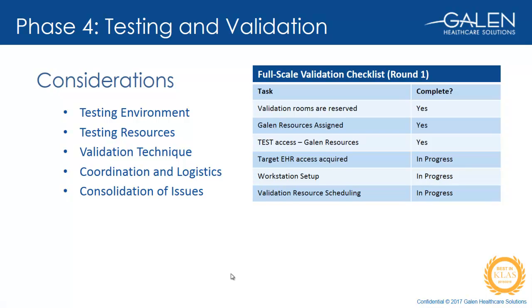So therefore, we usually recommend that the testing environment be refreshed very close to when the project team will begin work. And other things, for example, the environments would need to be in sync in terms of the software version and the like. So another item to discuss with the client is the plan for converting patients into the environment being used for testing. Sometimes an ADT interface may be set up. We often recommend pointing it at the testing environment to convert the patients. Or if the patients are already in production, then they can be brought over to the test environment via a refresh, as we've been discussing. Or maybe just directly loaded from the legacy environment.